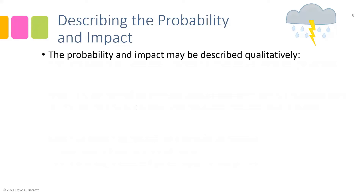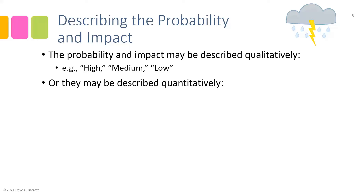Probability and impact may be described qualitatively, which is the more common approach. As I was expressing just a moment ago, qualitative description means we say things like high, medium, low, likely, unlikely, very likely — those are qualitative, more or less subjective descriptions of probability and impact. Or they may be described quantitatively, such as a 10% probability or a $10,000 impact. That's a quantitative way of describing probability and impact.